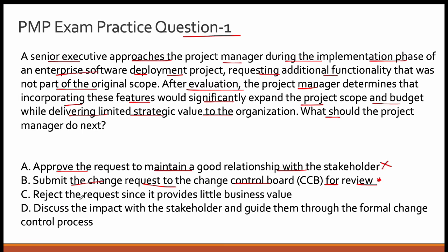Okay, option C, reject the request since it provides little business value. Again, you can't straight away reject the request, and even the project manager cannot approve or reject a request. That decision has to come from the change control board. The project manager can recommend, but he or she cannot approve or reject a change request straight away.